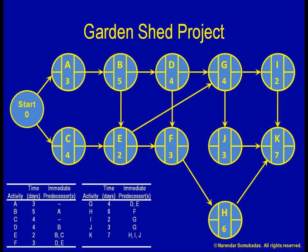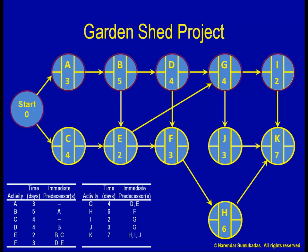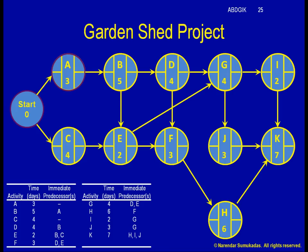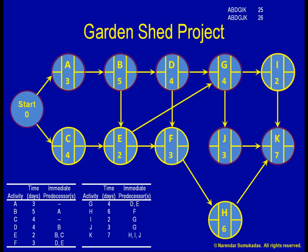How do we identify our critical path or figure out how quickly the project can be completed? One method is to trace every single path from beginning to end. The total of the activities on path A, B, D, G, I, K is 25 days — 3 plus 5 plus 4 plus 4 plus 2 plus 7. Likewise, the total for path A, B, D, G, J, K is 26 days. In a similar manner, we can list the total for every possible path.